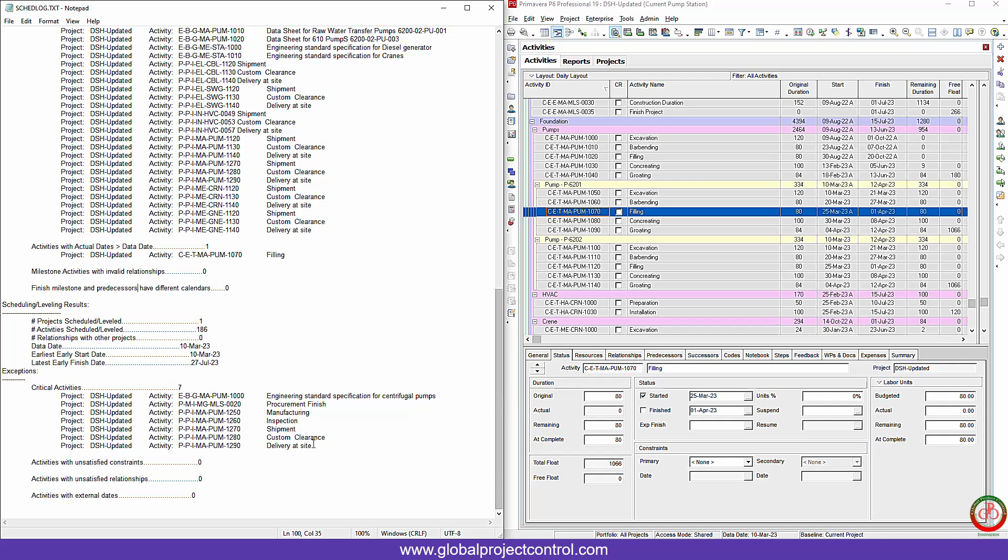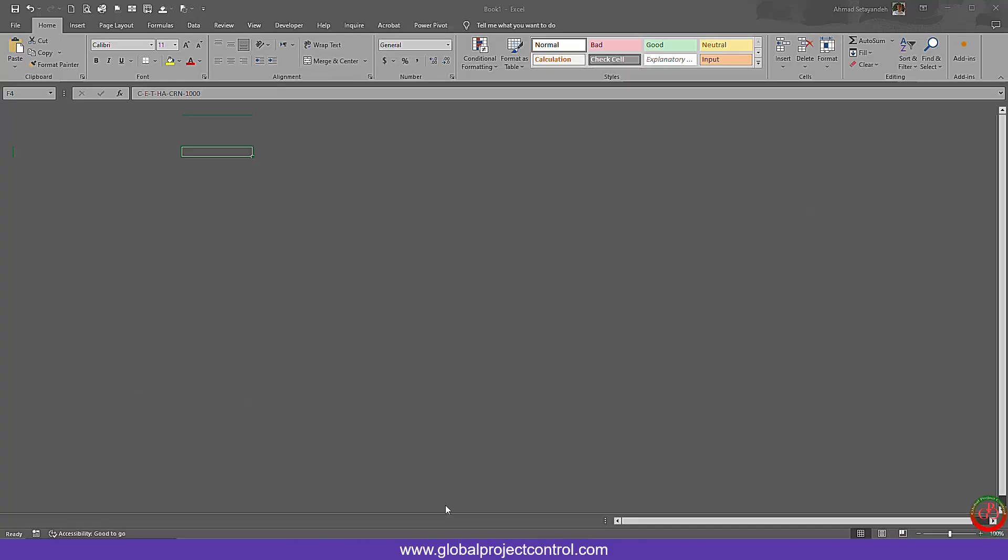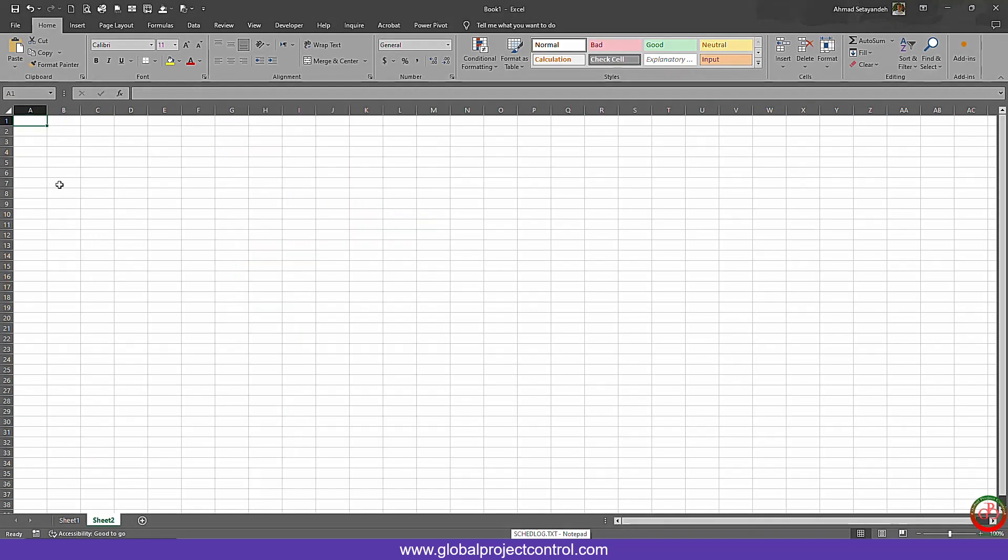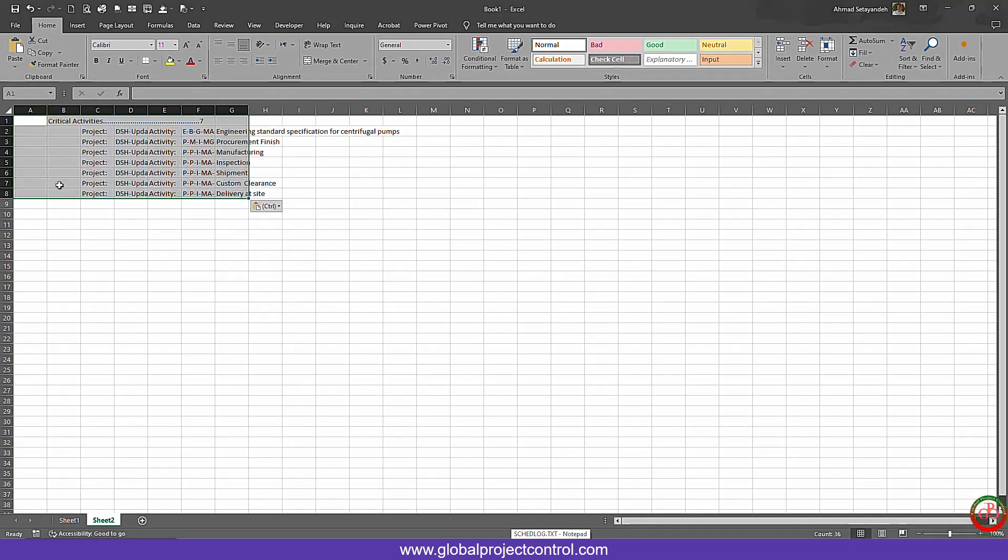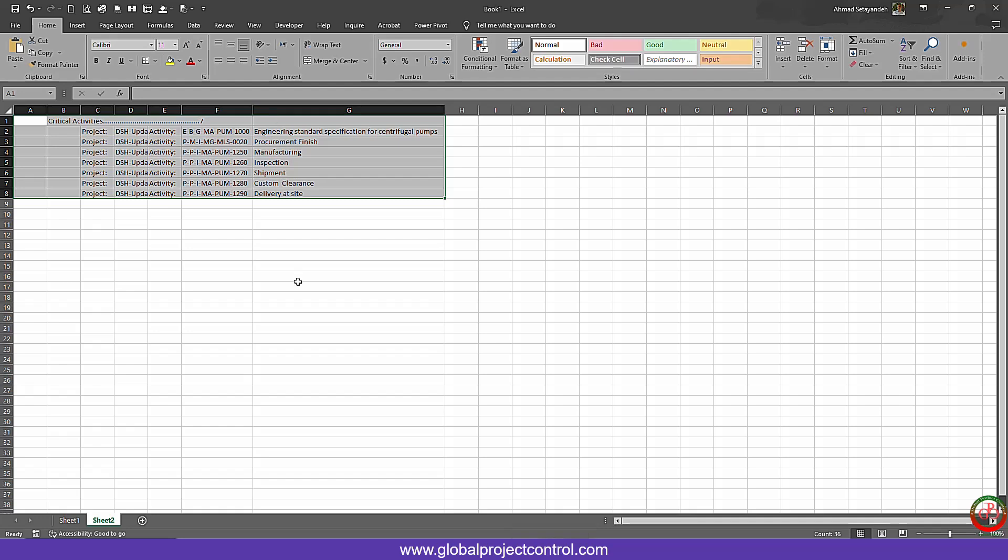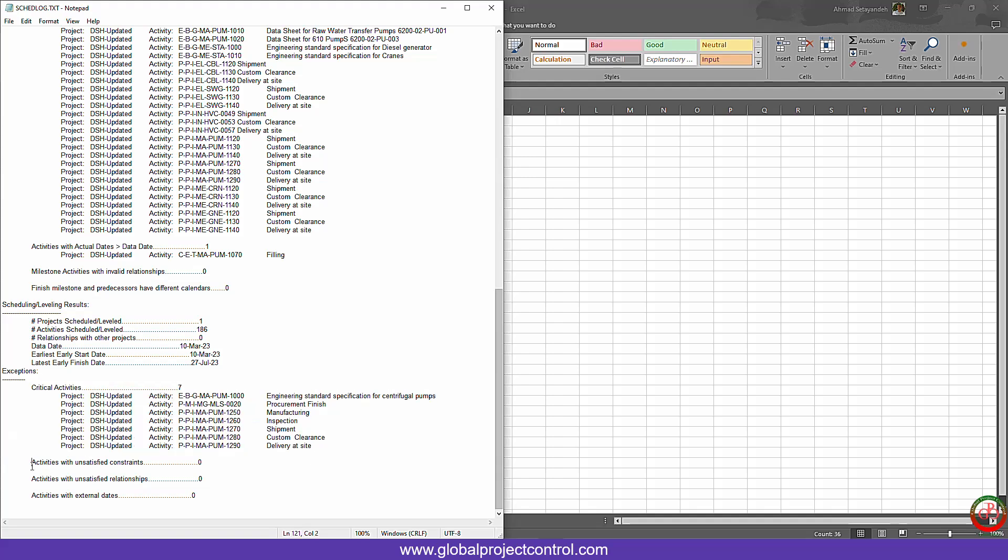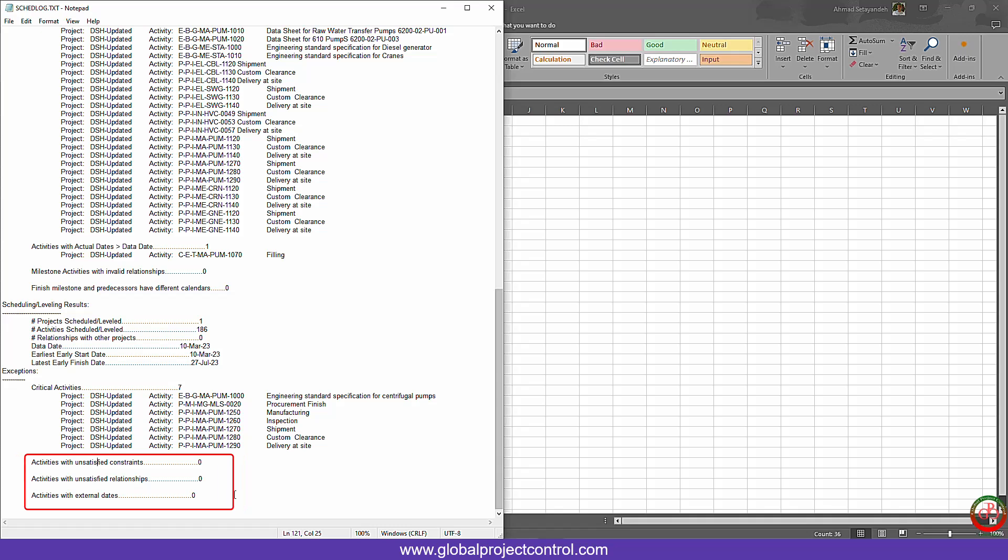So if you want to have the bulk of information for the critical path, you can only copy this. It is exactly the same as the out of sequence activity. You can work it into the excel. Now the critical path is available on the excel. And over here if you have activity with unsatisfied constraint, activity with unsatisfied relationship, and activity with external date to be located over here. If the last one, activity with external date, is found by the software, it means that you have the external link on this project.